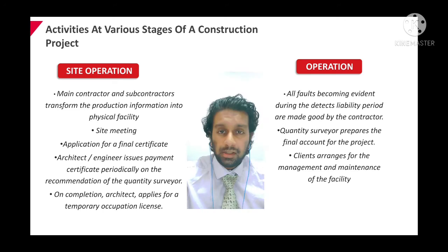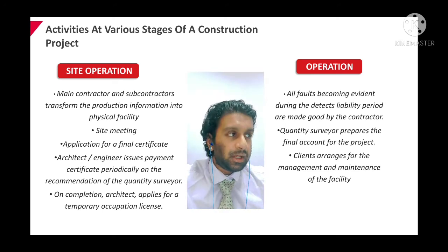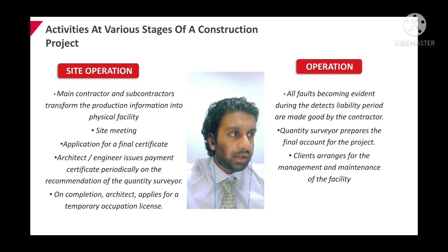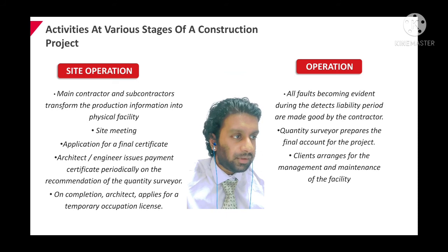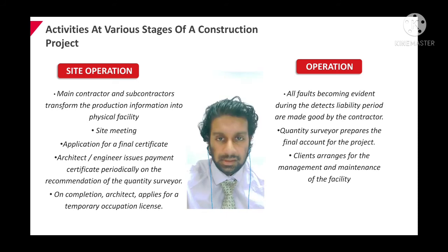And then we have operation, where all faults becoming evident during the defects liability period are made good by the contractor. The quantity surveyor prepares the final account for the project. Clients arrange for the management and maintenance of the facility.